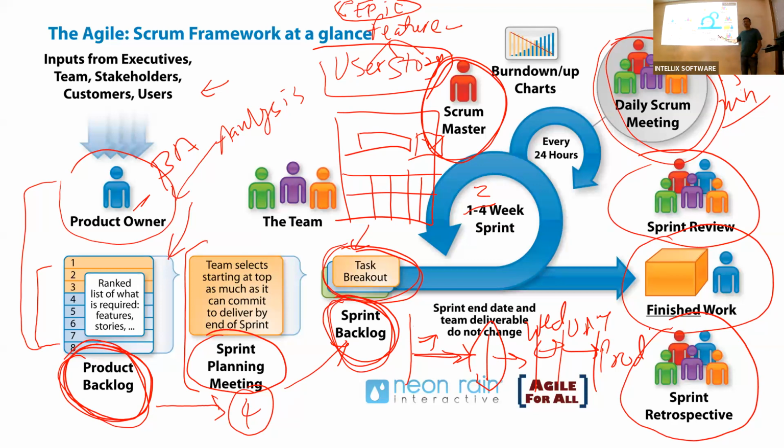Some feature they could not deliver. Maybe they delivered only 2 searches, but there was a third piece. The user wasn't available for clarification, so they say, oh, we cannot deliver. So we have to create another story and put that in the backlog so that we can pull it in, or have a defect open because we could not deliver the software. So they will reflect on the sprint activities and say, how can we improve this? Maybe we bring that user into the daily Scrum meeting so we can get the clarification, whatever the solution is. They will discuss as a team and come up with a way to improve it. That's the whole goal of the sprint retrospective.